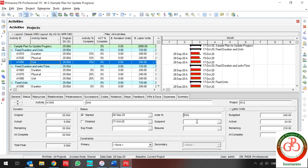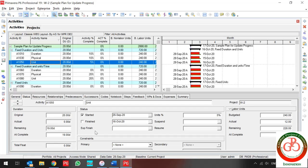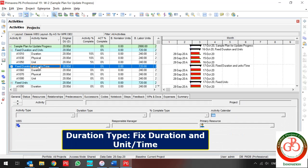If I click Start on the activity where the percent complete type is Unit and I choose 10%, the actual updates automatically. However, the remaining duration does not change. If I then enter 19 days for remaining duration, everything updates — my actual and my percentage recalculate based on the remaining duration.